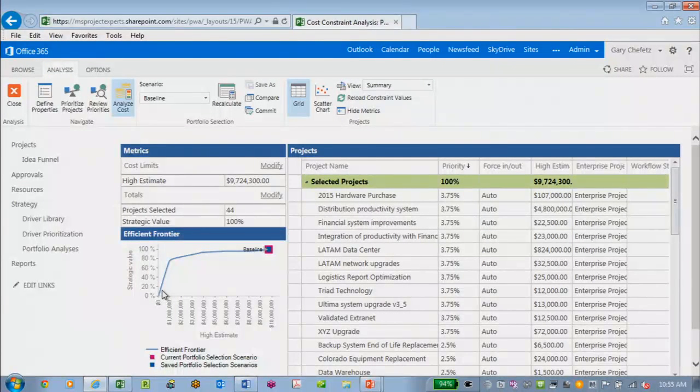And I'm sure you've heard a lot about benefits in the conference already today. So we want to put measures in here that are going to give us something to chew on. You can use a priority rating system, but couple that with capturing some benefit value. Again, I recommend net present value. That is a true measure of what the project's delivering. If you're monitoring net present value on a project, you'll know when to kill them. And sometimes that's the hardest thing.